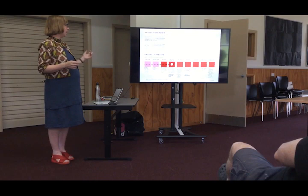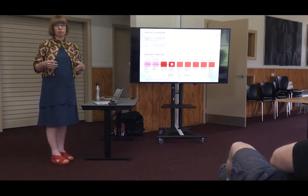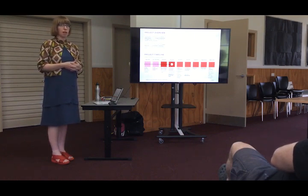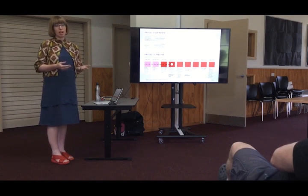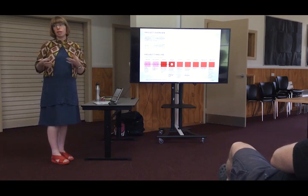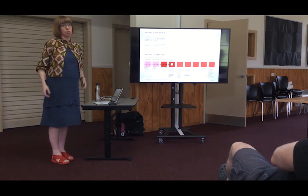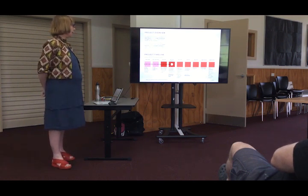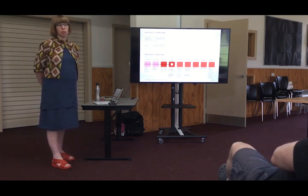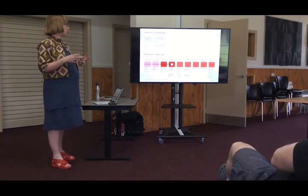So at the moment, we're in the draft concept phase, which is what today's meeting is about, getting first-hand community response. We've also got another community meeting planned for, I think, the 19th of January. So that'll be my Saturday afternoon, so hopefully there'll be other people here on holidays as well as residents, getting some of that tourist market up here to talk to them about what they see as important too. And then we've got the response time open until I think the 25th of January, just before everyone goes back to school and work, I suppose, just to get all those responses back together.